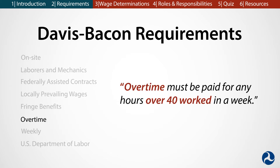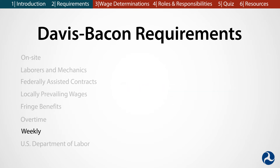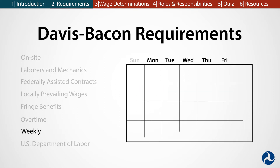Overtime. Laborers and mechanics working on DBA-covered projects must be paid overtime pay, which is time and a half, for any hours worked in addition to the 40-hour work week. Workers earn their fringe benefits for all hours worked, including overtime hours, at the rate in the wage determination. Weekly. Laborers and mechanics that work on DBA-covered projects must receive their pay and fringe benefits once per week.